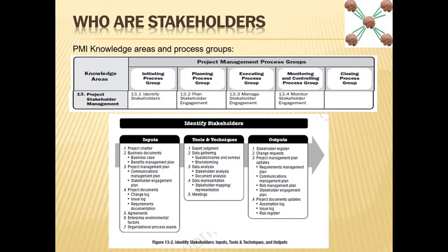When you identify the stakeholders, you need to identify basically two or three kinds of things about them. Not only identification is required; you need to identify who the stakeholder is, what kind of effect or what kind of powers he has on the project, and how he has to be satisfied. I mean, how you need to communicate with them. This is at least the three minimum things that you need to know about each stakeholder of your project.